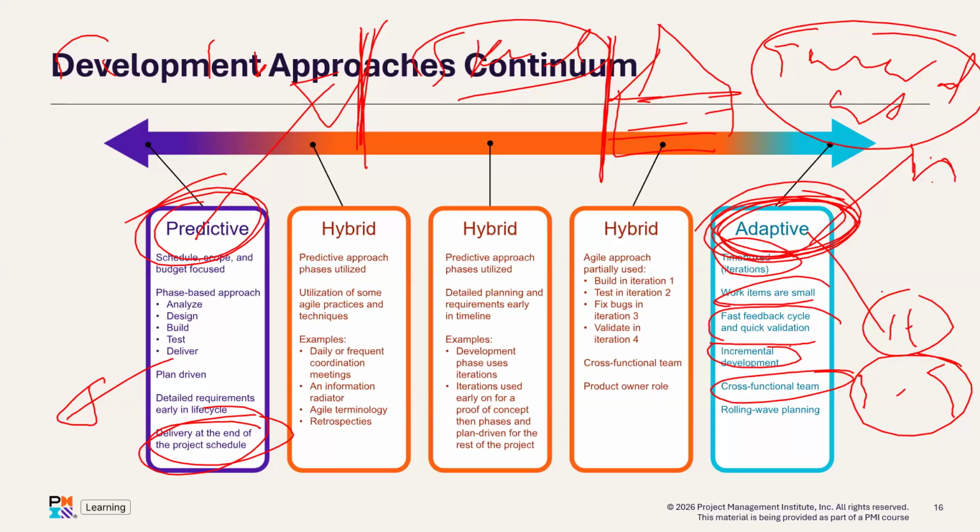The adaptive team will follow rolling wave planning. With rolling wave planning, we plan in detail the work that will be done in the near term and leave the work that will be done in the future in a high-level plan. And once we finish this, then we come and detail that out and leave the rest. And then on to the next wave. So progressively, we elaborate on the scope, the level of detail, as the work progresses. Rolling wave planning, or progressive elaboration.